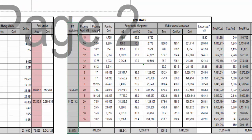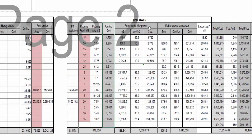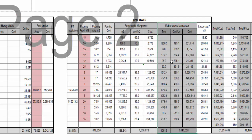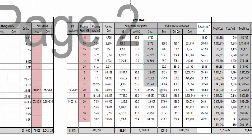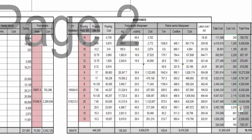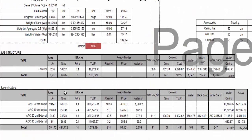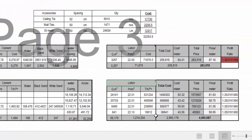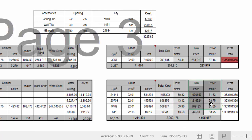Here is the manpower required for post-tensioning, concreting or pouring, formwork and shuttering as carpentry, and rebar fixing. You have a full budget for your activity to monitor during execution — full labor cost per cubic meter, total cost per activity, cost per meter, and the total price after CMS adds the profit ratio automatically. The same applies for block work — all block types, material costs including block, mortar, cement, water, sand, curing, and accessories, calculated automatically, plus labor cost and total cost per meter for each block type, with final price after profit.